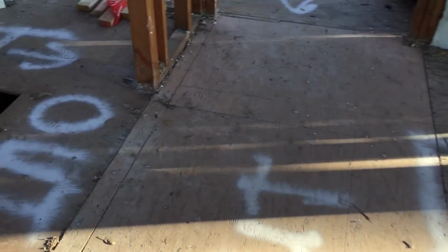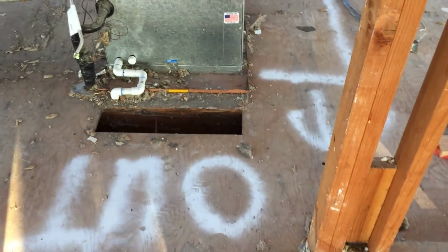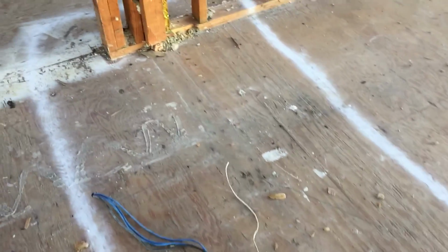these floors here. The subfloor needs to come up, hopefully in relatively concise chunks, because they have to do their new foundation footing under there, as we called out before. So hopefully when the demo crew comes today to start taking that out, they can pull up those subfloor boards to just get them out of there. And then this whole chunk of the house will start coming down today as well.